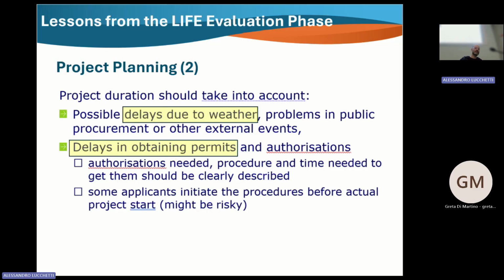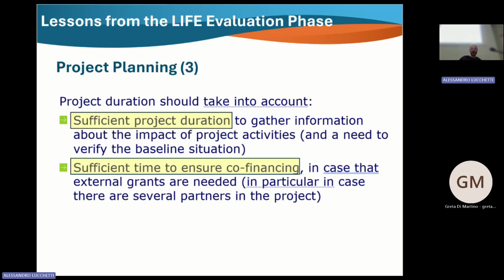You have to identify the possible gaps that you can face in a project and the possible mitigation measures, such as lack of cooperation by fishers that will hamper activity at sea. This could be a problem, obviously. A solution could be involving fishermen associations to provide this and this. You have to provide the problem and the possible solution.